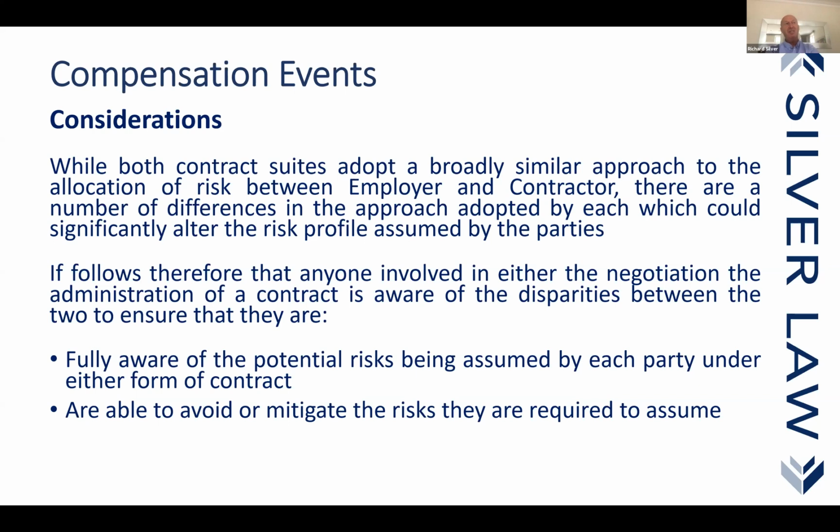The other thing is we're doing assessments based upon quotations and what we foresee the delay will be. So you can make a quotation that means you actually recover more than you actually incur, or less. You can lose money. You can submit quotations for compensation events that are wrong and thereby lose money. You assess the delay is 6 weeks and it proves to be 10, hard luck. You assess it to be 6 weeks and it's only 3 weeks, well done.